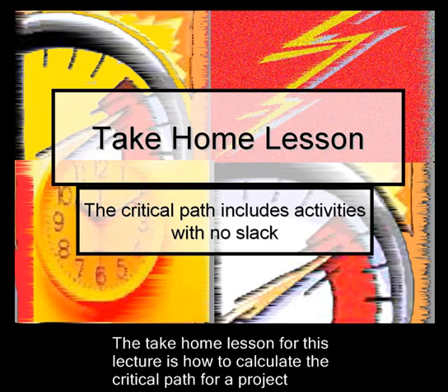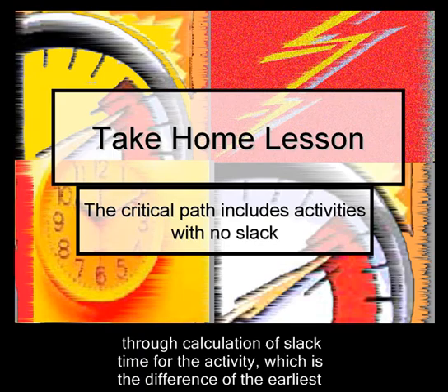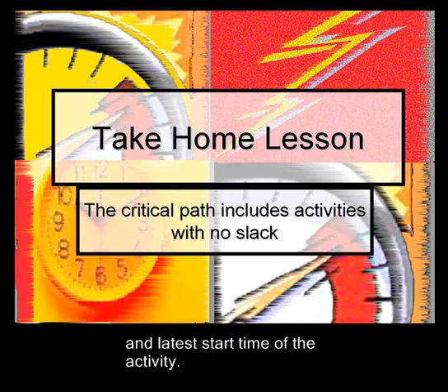The take-home lesson for this lecture is how to calculate the critical path for a project through a calculation of slack time for each activity, which is the difference of the earliest and latest start time of the activity.